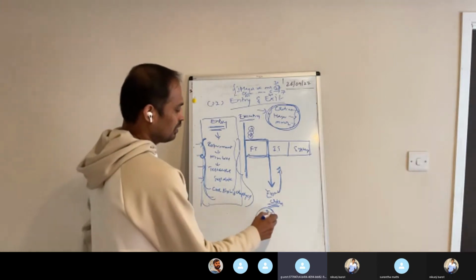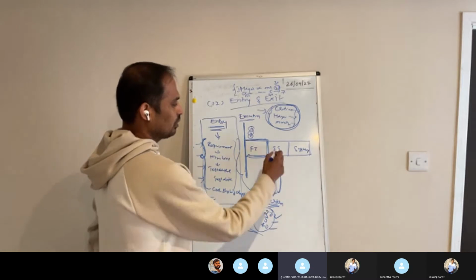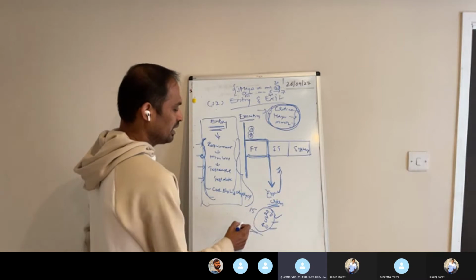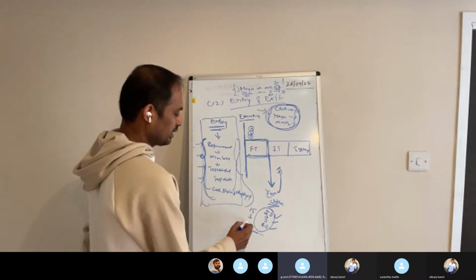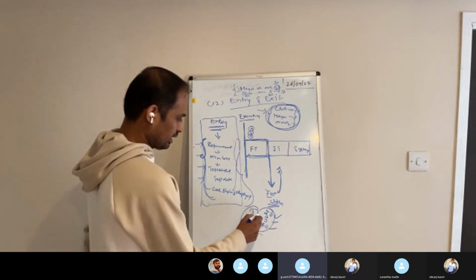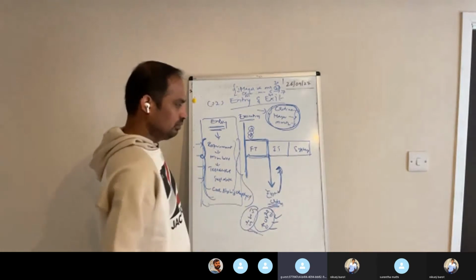In the same way, if we have met all these conditions, then we'll go for integration testing. Say we have only 15 major defects, 3 critical defects, and 25 minor defects. So we have met the exit criteria, and then we start integration testing.